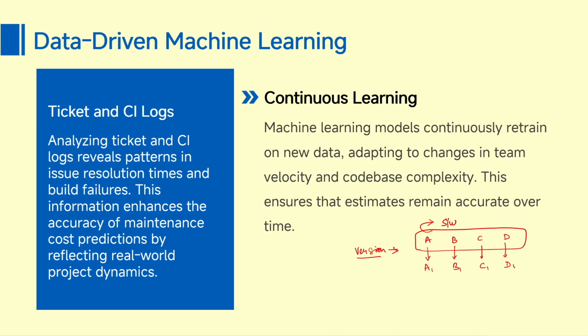First we have delivered some working software with respect to all the 4 modules, which is A1, B1, C1 and D1. Put together, this is one working software, and I can call this the baseline, because this is the first base model which is working. Assume that after this baseline product, there is a change requested with respect to A, and we make that change and provide A2, which is version 2.